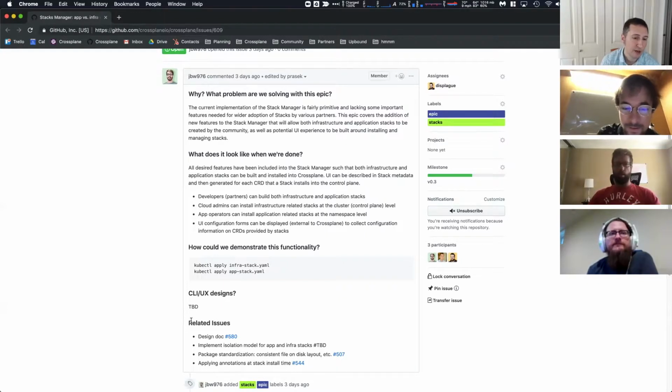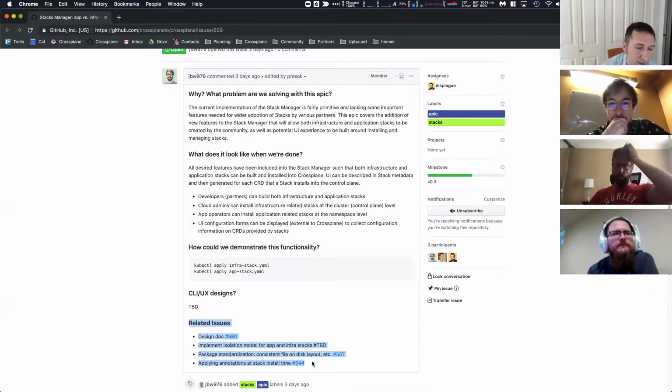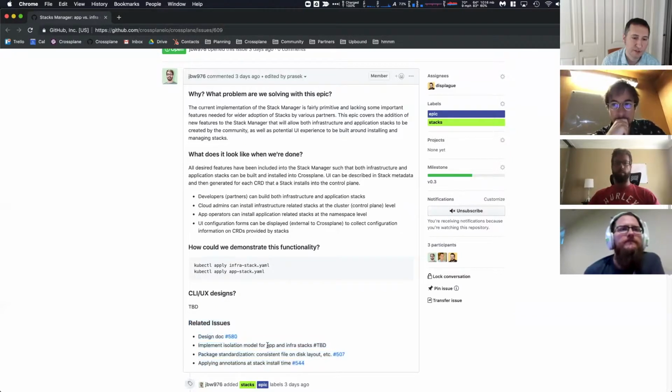And then down at the bottom, we have a set of related issues. And so that's kind of feature scoped issues. So we're trying to target, as you can see here, labels for like epic and then the group. So this is an epic, and then having the sub issues be more feature focused. So these are like the 5 things that we want to do within this epic. And so that's just the draft list there.